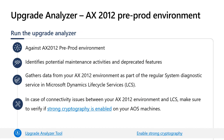The Upgrade Analyzer works by gathering data from your AX 2012 environment as part of the regular System Diagnostic Service in LCS. It runs on top of that service and builds analysis based on telemetry collected from AX 2012. If you have already been using System Diagnostic Services, there is nothing more to configure. If you haven't, you need to configure it first before viewing results. One key tip: you may run into connectivity issues between your AX 2012 and LCS. In that case, enable strong cryptography on your AOS machines so they can communicate with the cloud securely.